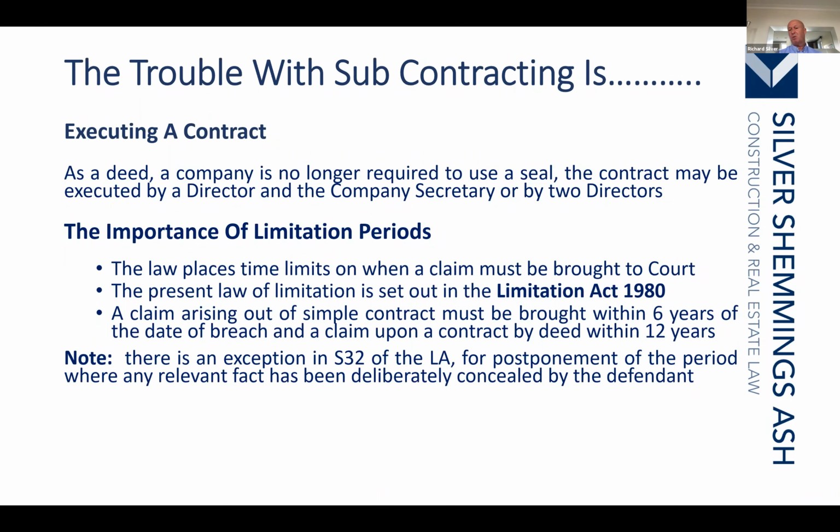For subcontractors, quite obviously, it's far better to enter into a contract under hand, so you've only got 6 years liability rather than under deed. For main contractors, nearly all your main contractors will be under seal. So it is imperative that you place your subcontractors under seal too.